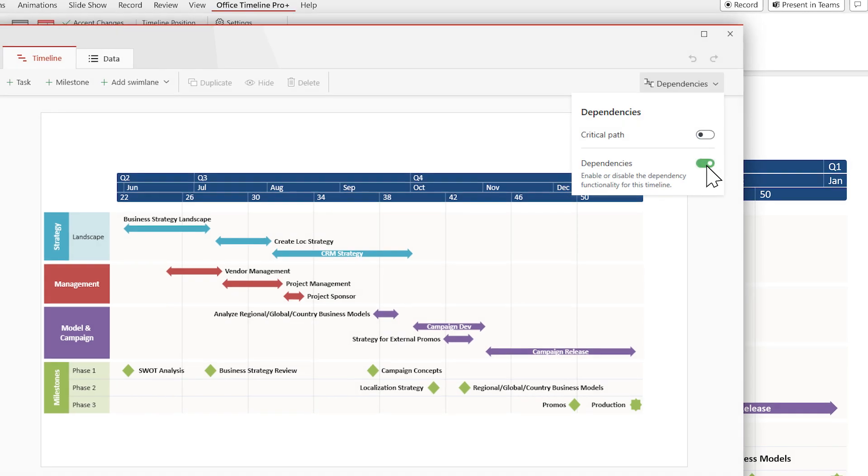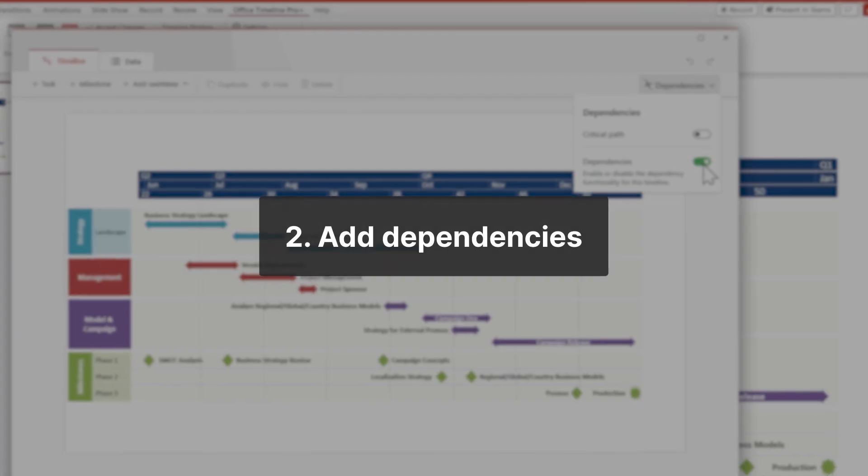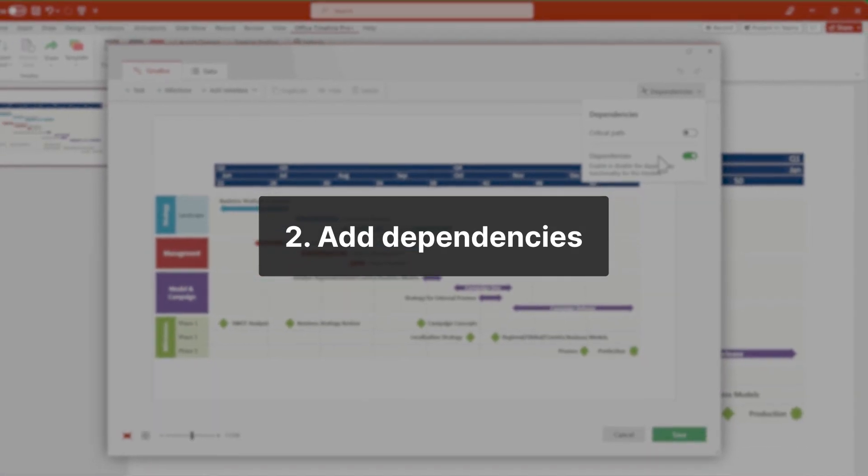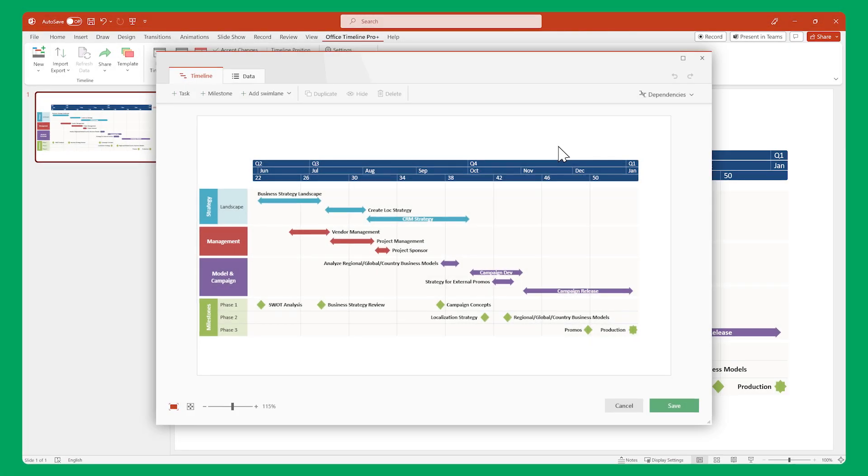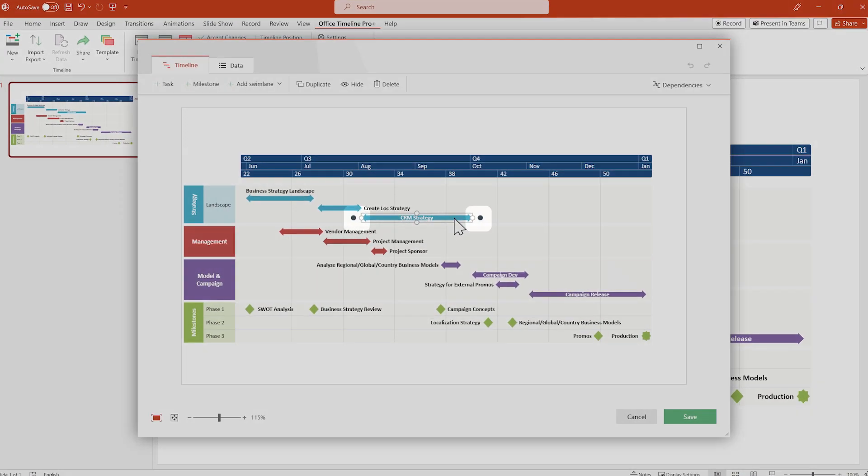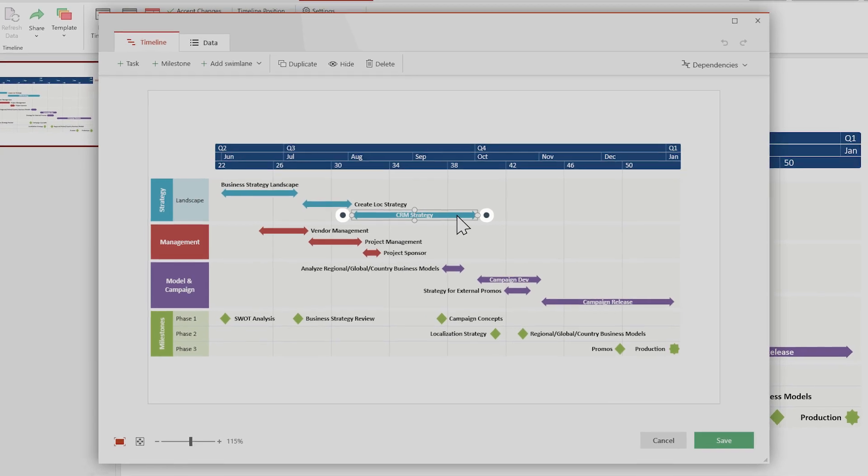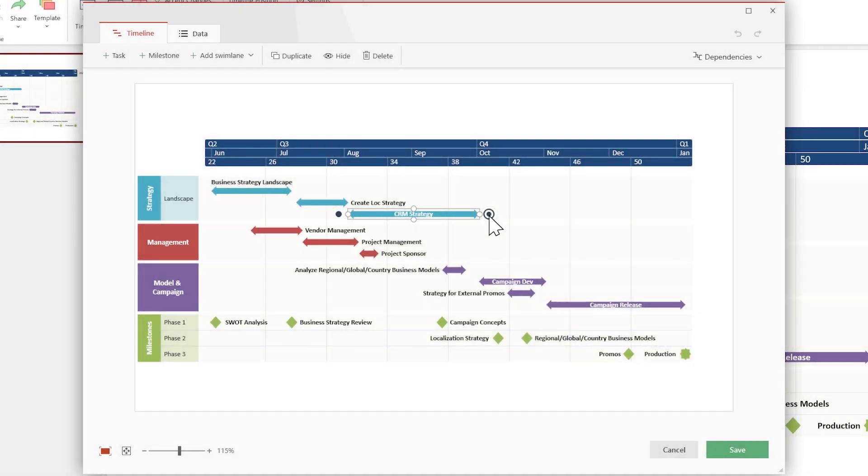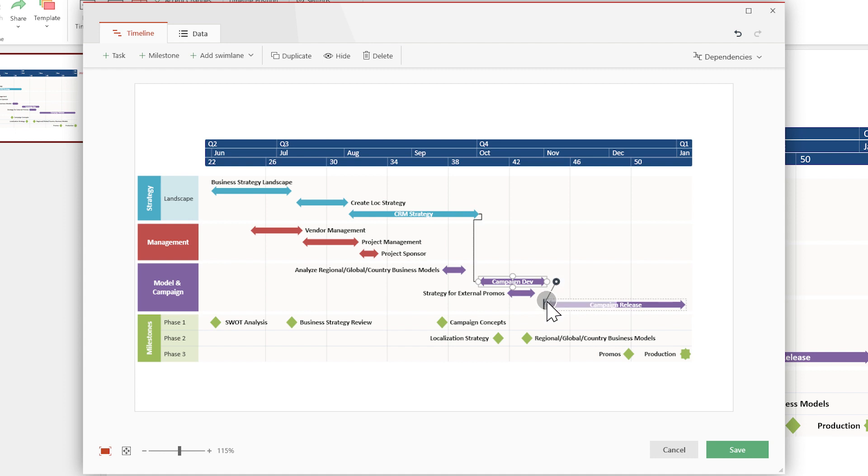Once you do that, adding dependencies is just a matter of drag and drop. While you're still in the timeline view, select a task or milestone and you'll notice two dark circles next to it. You can click on them and drag to another task or milestone to link them together.